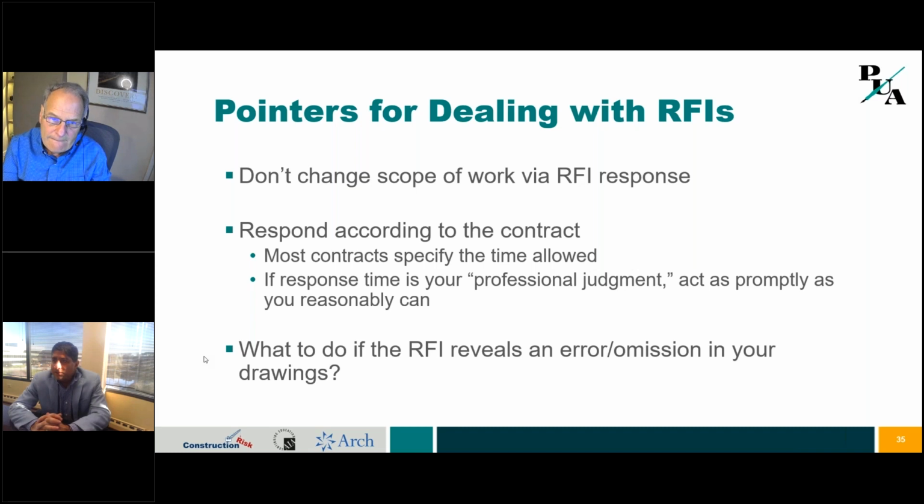Okay, and then Aaron H. asks, can you talk about the difference between notifying the owner about a safety issue and notifying the contractor? Can the design professional tell the contractor there is a safety issue without telling them how to proceed? Yeah, that's a great question. So if your client is the owner, your communication should be with the owner, not the contractor.